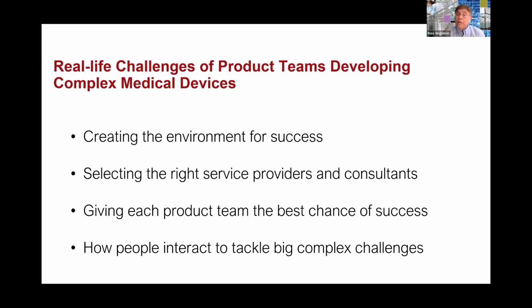The only other thing I'd say is you want a cross-functional team, not just within engineering, but inviting marketing and manufacturing earlier in the development, so that you're thinking about getting it across the finish line. And the finish line, as Walter pointed out, is manufacturing, not having a prototype. And if it's a medical device, you've achieved 510(k) or whatever applies wherever you are in your development.